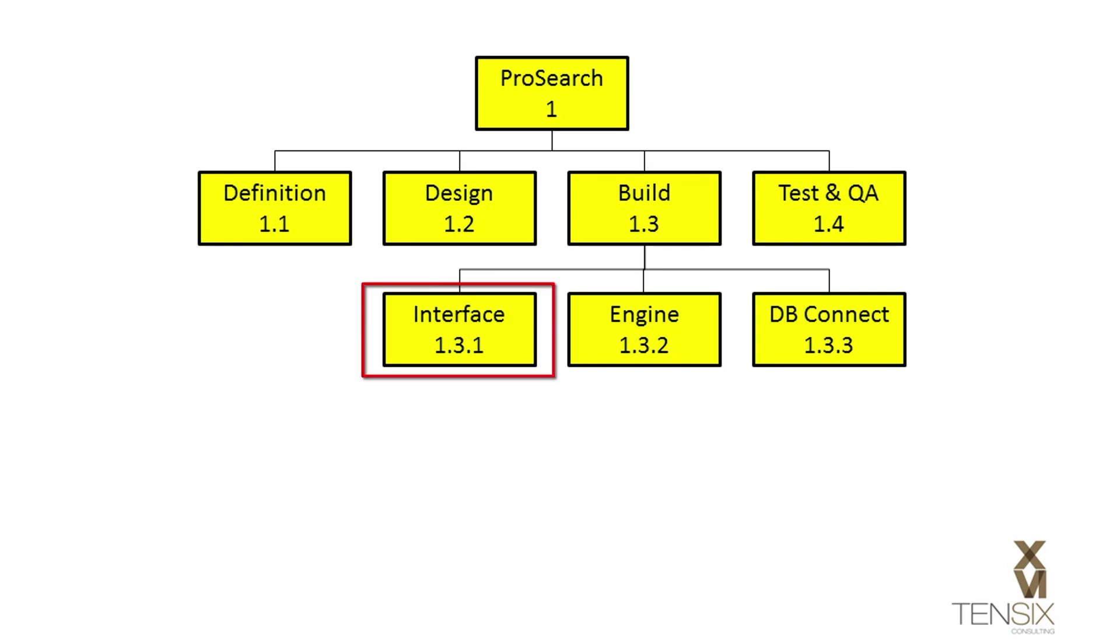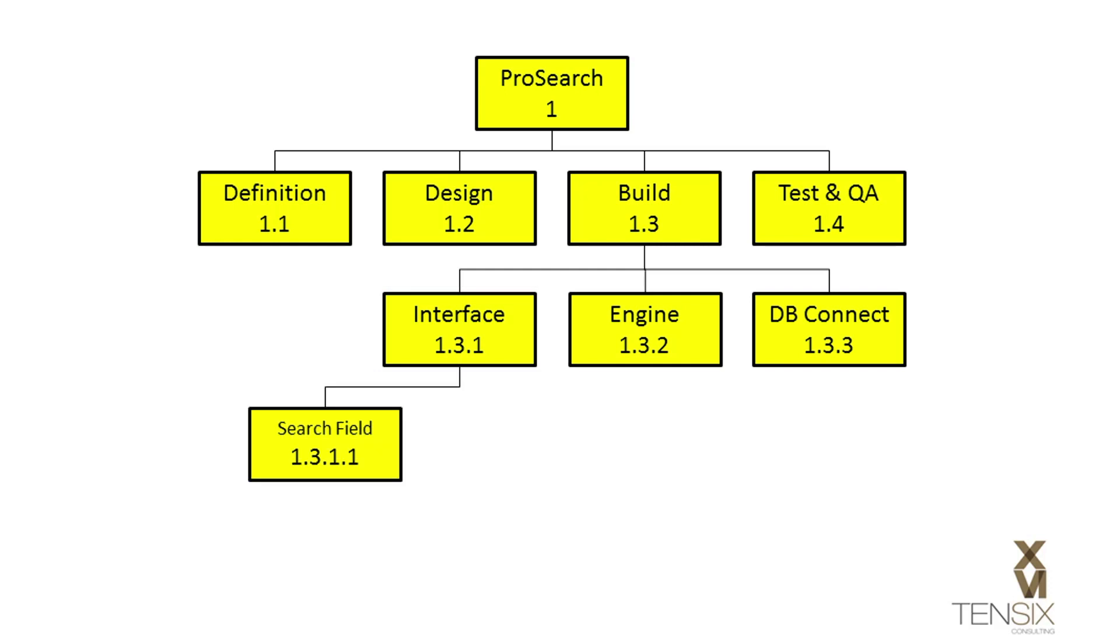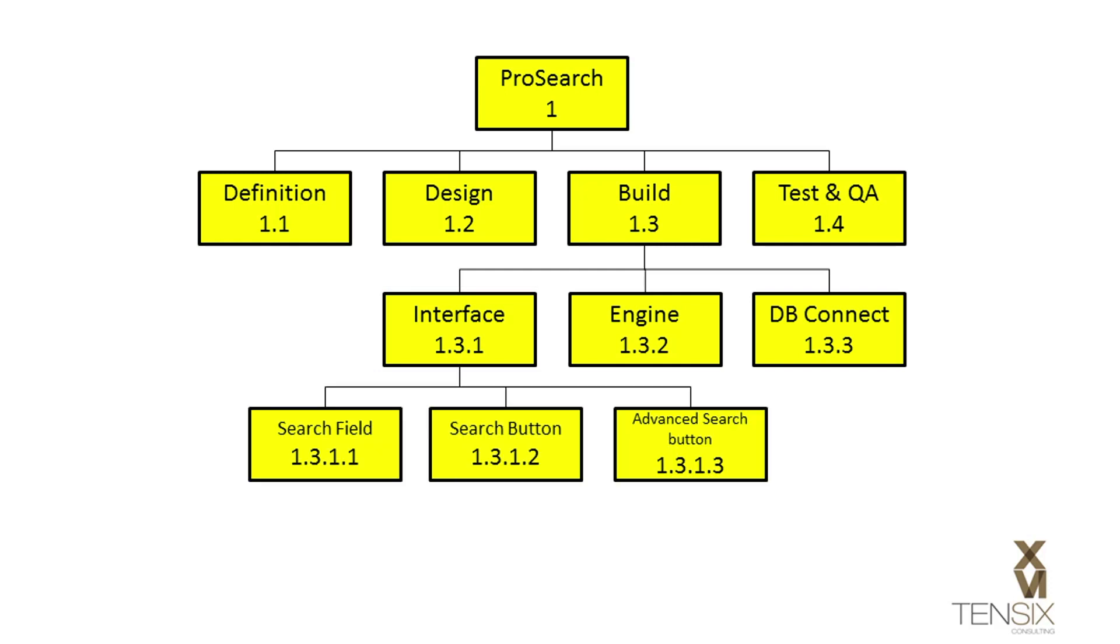Let's say that we broke the interface WBS element into its three logical deliverables, and ended up with search field, search button, and advanced search button elements.